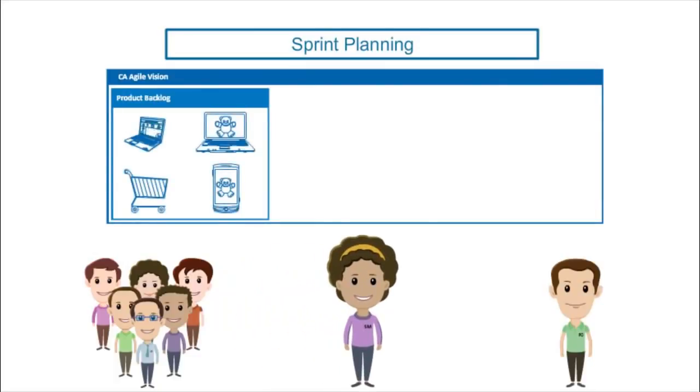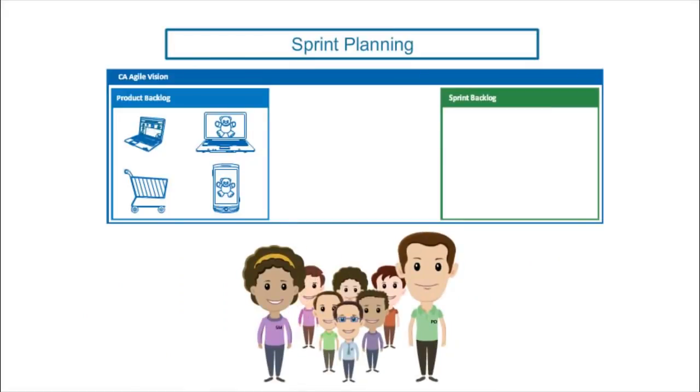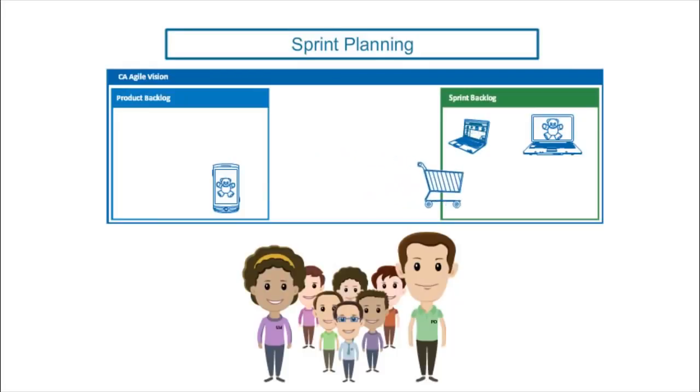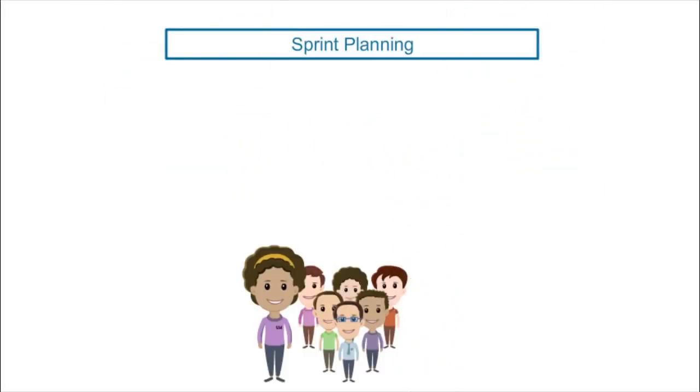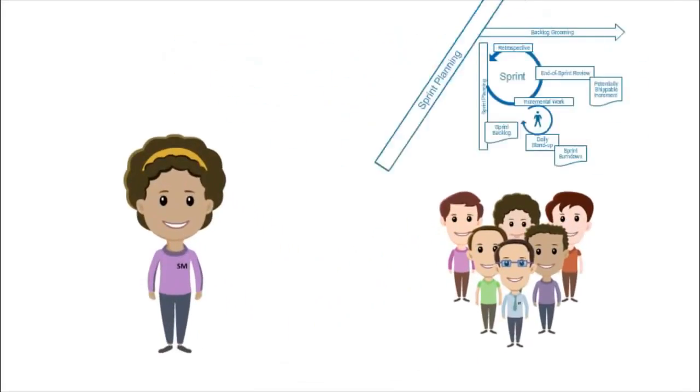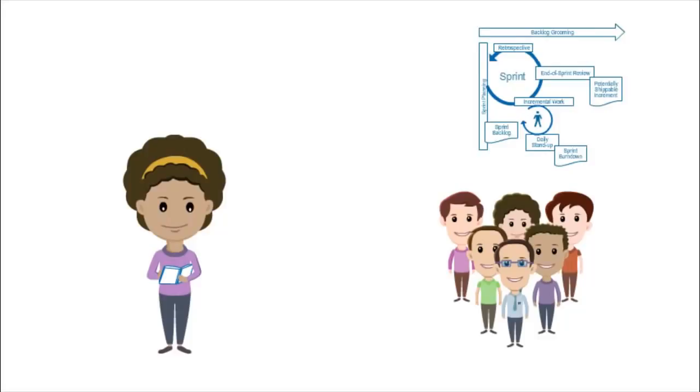They also size the stories in order to determine which stories will fit into the sprint. Tammy moves the highest priority stories to the sprint backlog, which defines the scope of sprint one. The team determines that they can work on four high priority stories: creating a website, developing description pages for Mary's most popular toys, creating a checkout page, and building a smartphone app for mobile purchases.